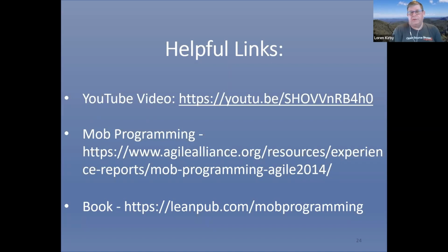Ideally, for mob programming, stories that are scoped to a day or less work best because we're able to pull something in the morning, make sure we have a clear understanding of that story, work the story to completion, and by the end of the day, we're moving that story into ready for test or into done. That was also one of the reasons we felt like Kanban worked better for us than Scrum. But there's no reason you couldn't use either of those methods with mob programming. As far as the size of the stories, I talked about that already.